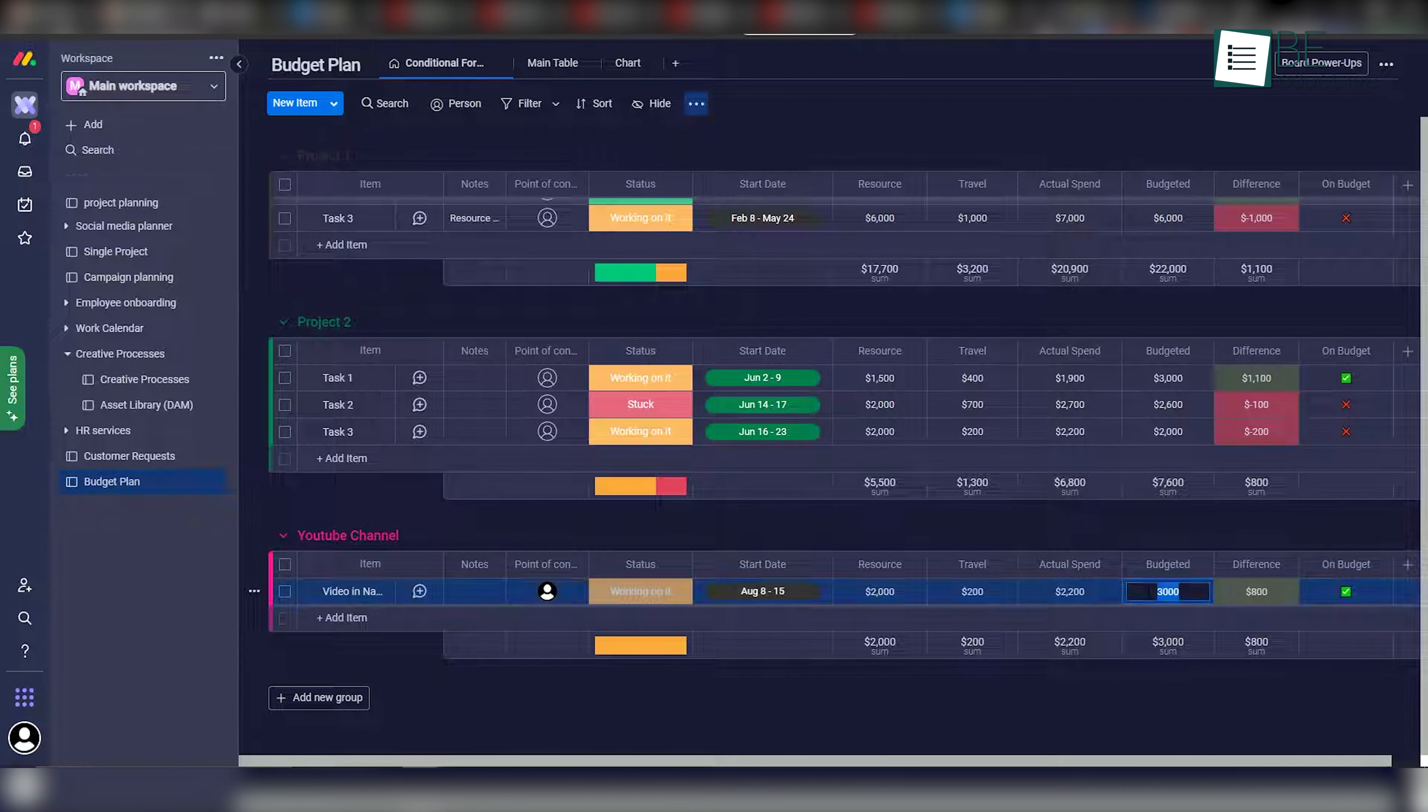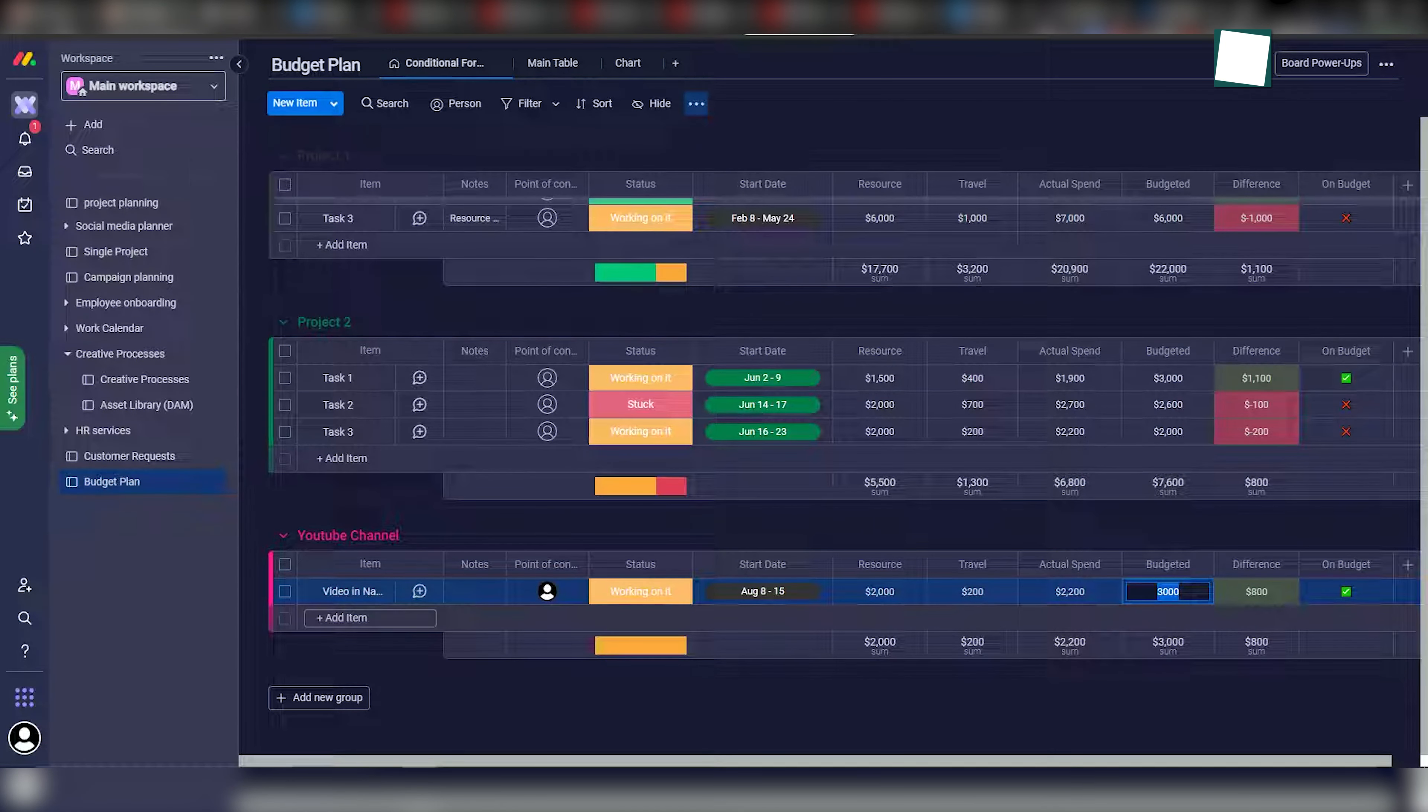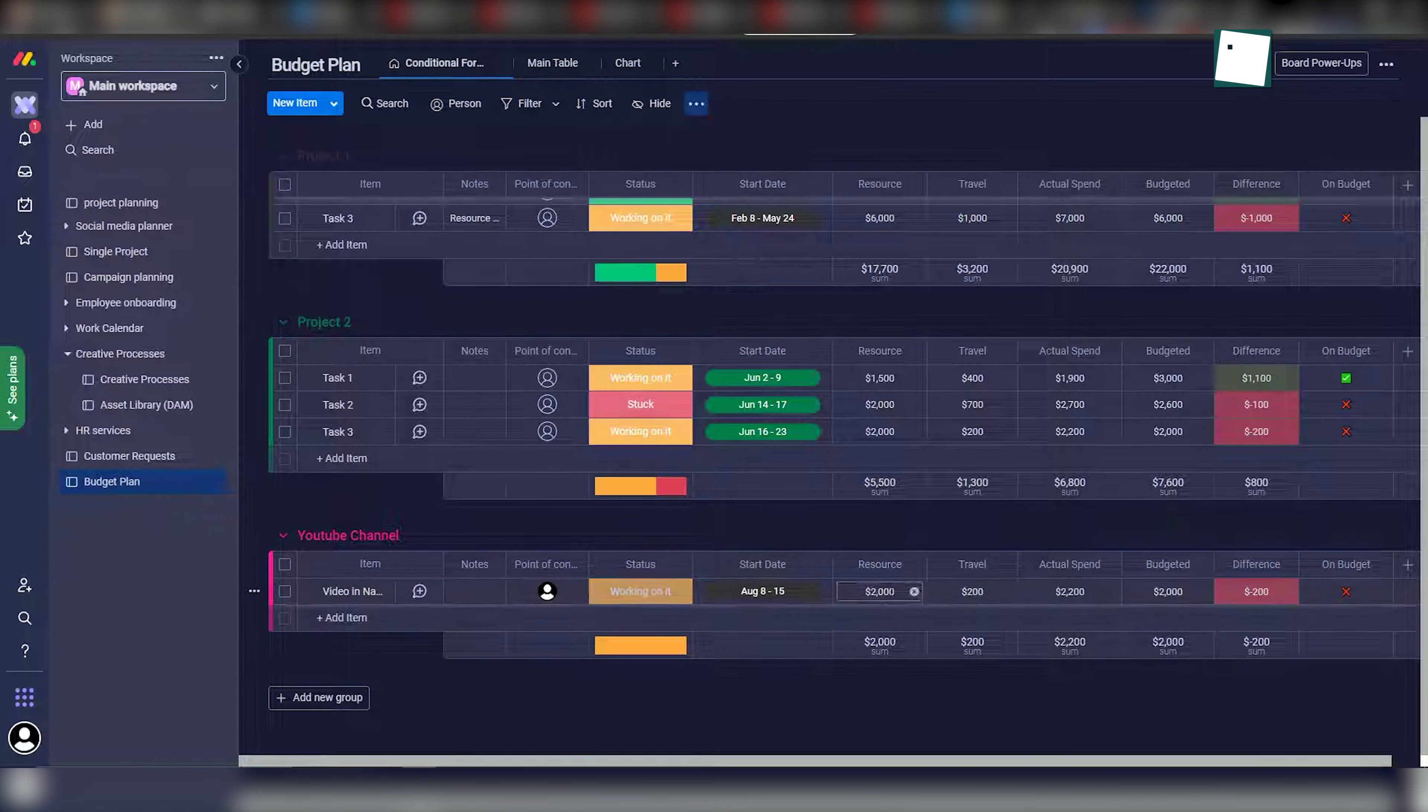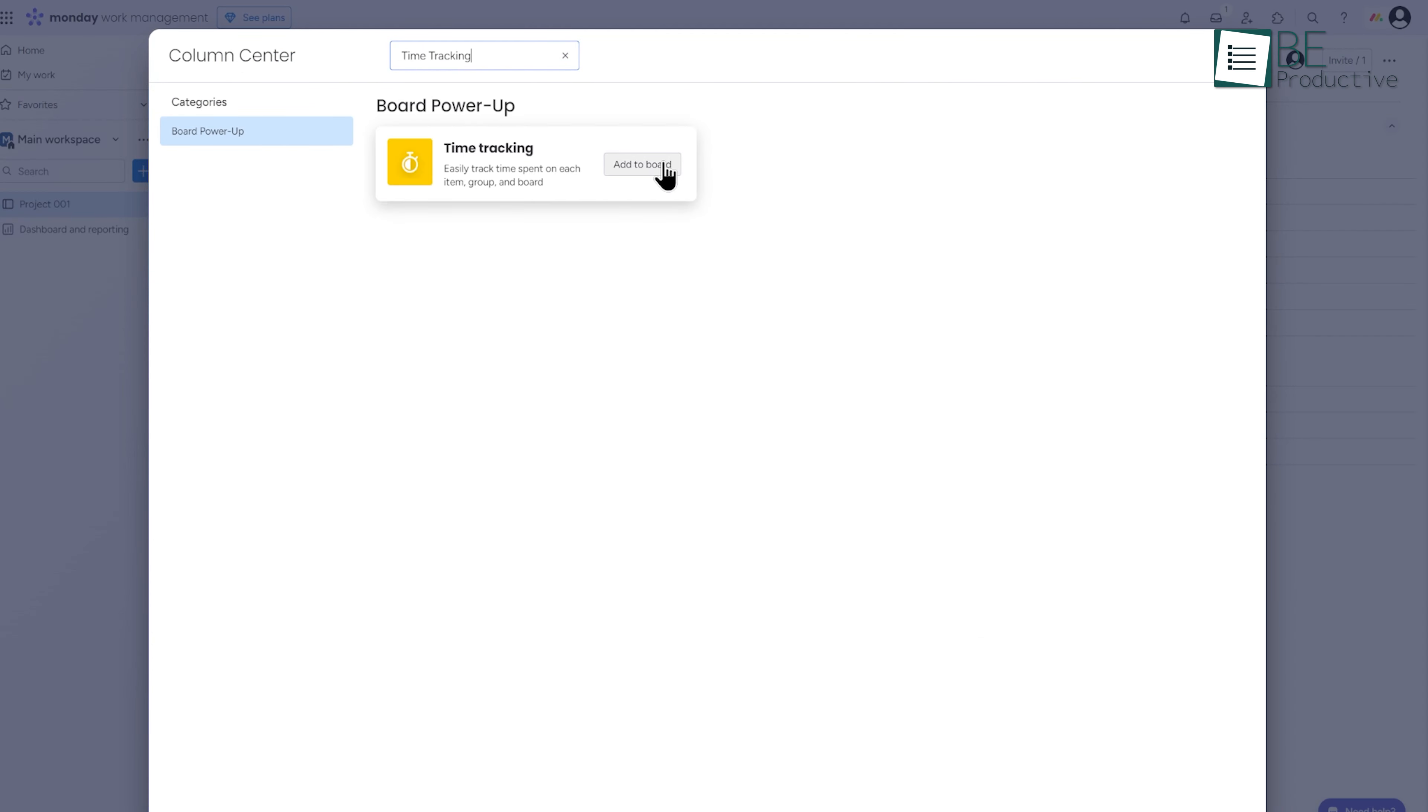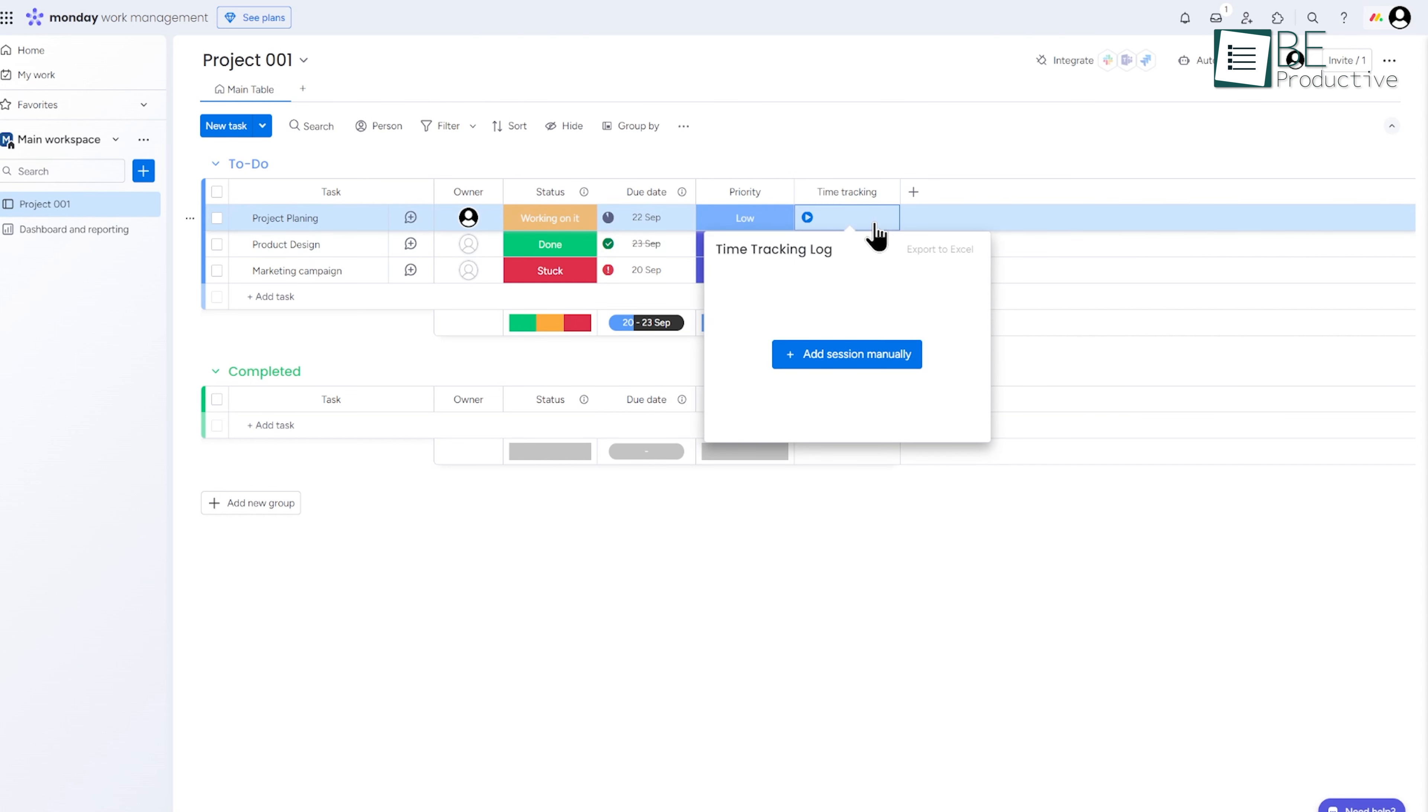All right, Monday.com goes beyond task management to help you keep tabs on time and budget. To add a time tracking column, click the plus sign next to the last column on your board, select more columns, and then find and add the time tracking column. Once added, you can start tracking time by clicking the play button on a task, with options to pause or edit entries as needed.